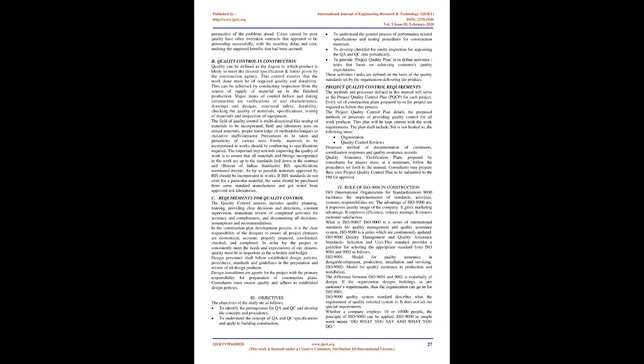Major items of control before and during construction are: verifications of soil characteristics, drawings and designs, structural safety, durability, checking the quality of materials, specifications, testing of materials, and inspection of equipment. The field of quality control is multi-directional like testing of materials to be incorporated, field and laboratory tests on mixed materials, proper knowledge of methods and techniques for executive staff and contractors, precautions to be taken, and periodicity of various tests.